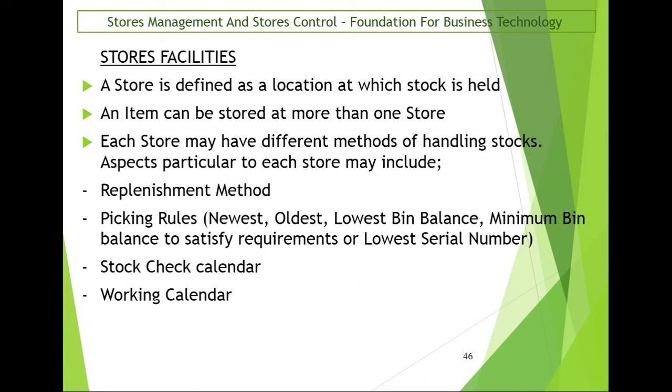The different stores will also have different working calendars depending on what is the actual business happening at that particular location. In some locations, there is a basic office setup that works from Monday to Friday. In other locations, they are having workshops or factories where things are being made, so their working calendar can be beyond the Friday, and probably they work Saturdays and Sundays, even overtime. So you need that ability to specify a customized working calendar for each physical store's facility.